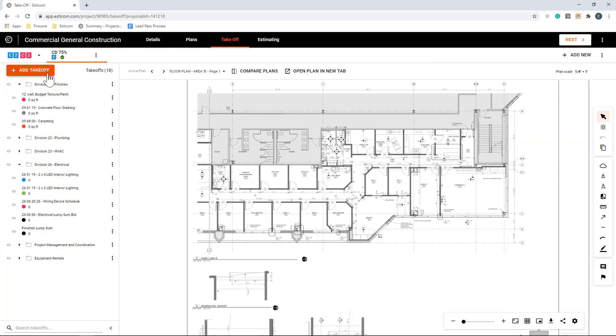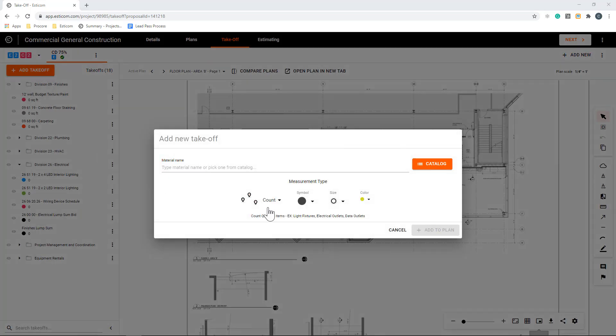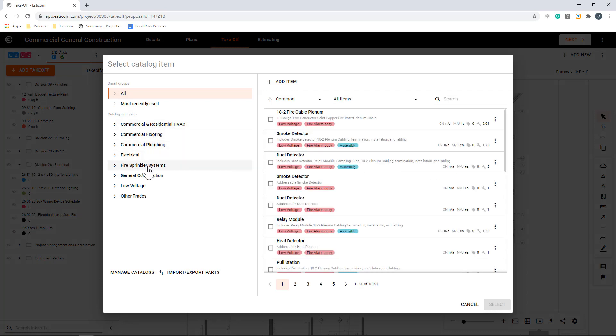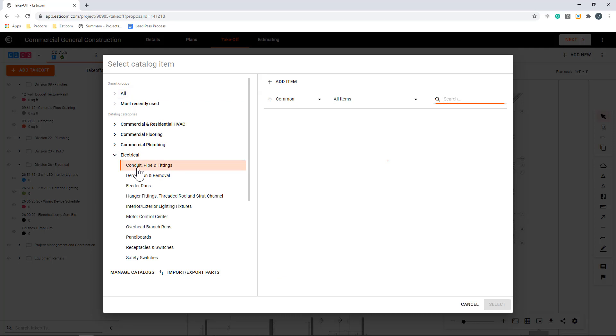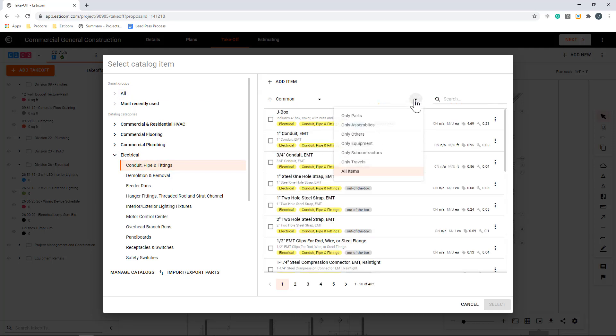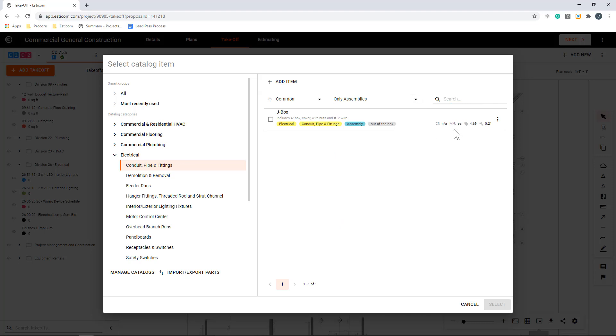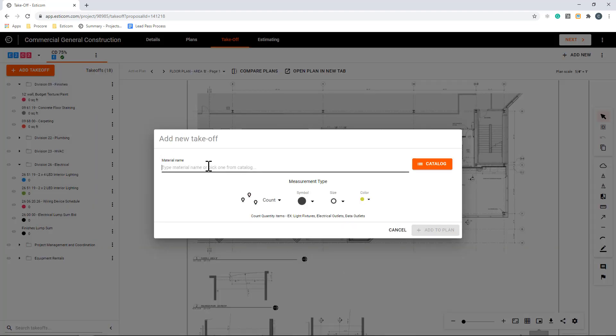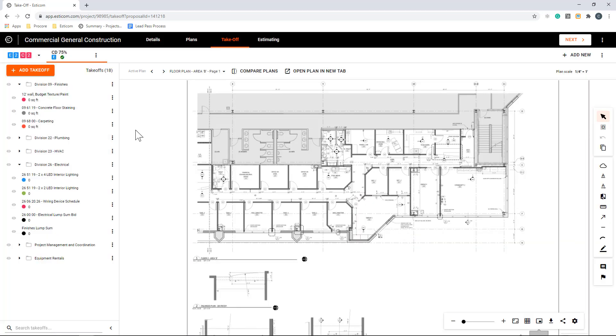Esticom includes many out-of-the-box parts and assemblies for common trades that you can search for and use while performing a takeoff, allowing you to estimate the project labor, costs, and materials as you perform a takeoff. You can upload your own database or add one-off items by simply typing the name of an item and adjusting your labor and material pricing on the later estimating steps. In our example, we'll start with the already created 12-foot wall takeoff for paint and texture, which uses a simple linear measurement with a height variable that we can adjust to get our square foot coverage area.